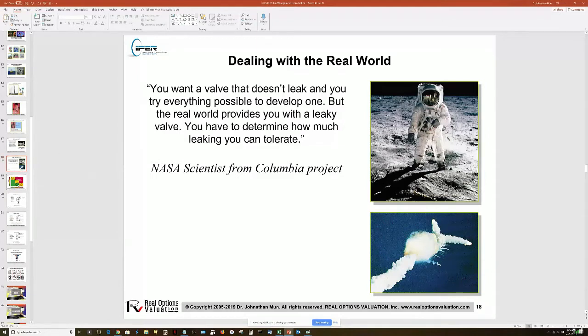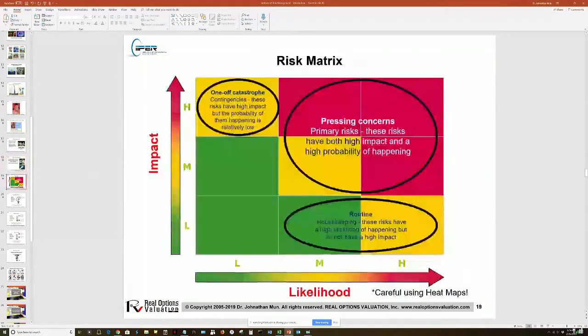So historically, we've done things like a risk matrix. Another name for a risk matrix might be a heat map. I know a lot of folks do this, like a red, orange, yellow. You might actually have a purple in there, a magenta, whatever, a huge color scale. And typically, you have an X and a Y axis, likelihood and impact, low, medium, high. You may have categories of 5 or 6 or 10, whatever you end up doing, and you multiply it out, then you get a KRI, a key risk index, a multiple, for example.